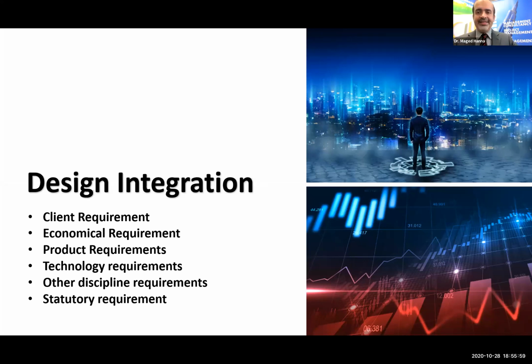Statutory requirement. And as I mentioned, just recently I was requested to audit a project. It's a high-level project, and the project was supposed to be finished in 3 months. It now takes 15 months. In the design, they use what we call the defect repair theory. What does it mean? They don't have a clue at all about what the authority requirement is. So they do a nice design, they submit, they get rejected. Then they take the comments.